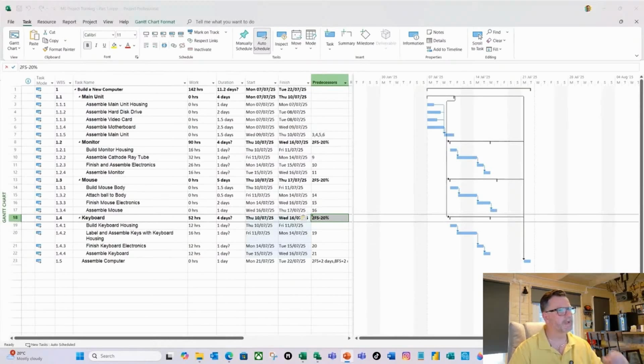I think for me, and I am old school, I believe that you should always have a milestone in your plan, or milestones. And those milestones should represent your product breakdown structure, i.e. the deliverables or the sub-deliverables within your product breakdown structure, or a key decision point within your project as well. I believe a group of activities should end in a milestone. So how do we get milestones into our project plan?